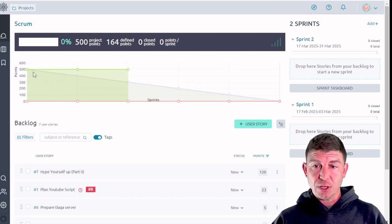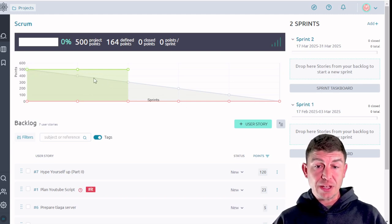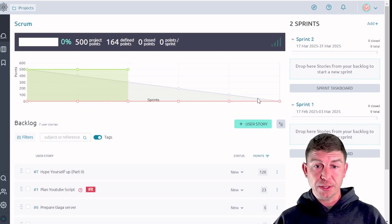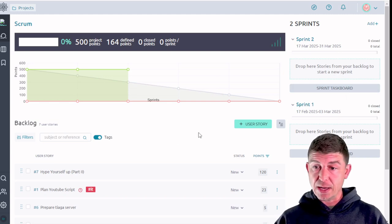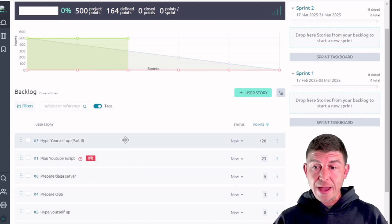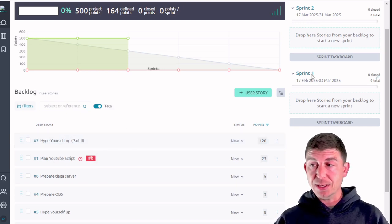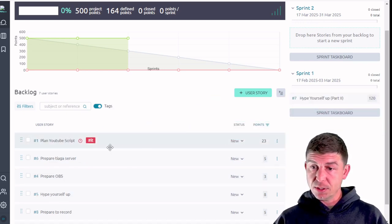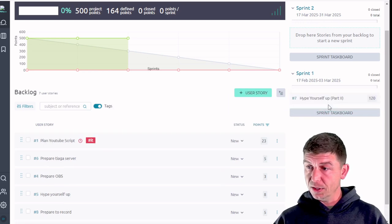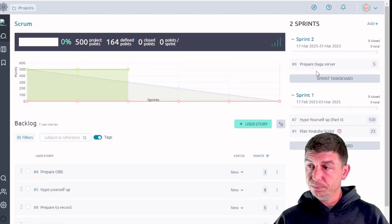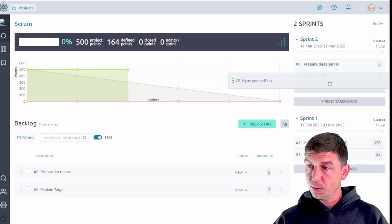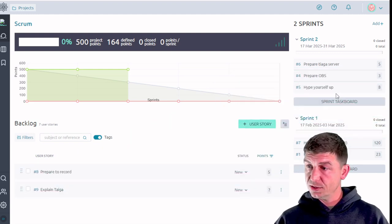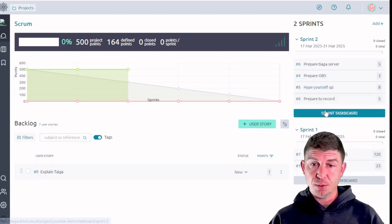And what it's showing right now is I haven't really gotten anything done whatsoever. And if I keep going at the rate that I'm going we're never going to complete this project. But over here on the right hand side you can see the two sprints that I just created. And then in priority order you're going to drag user stories from the backlog into the sprint. So I'm going to go ahead and drag this first one and the second one into sprint 1. And then I'm going to drag the third one, the fourth one, the fifth one, and the sixth one into sprint 2.